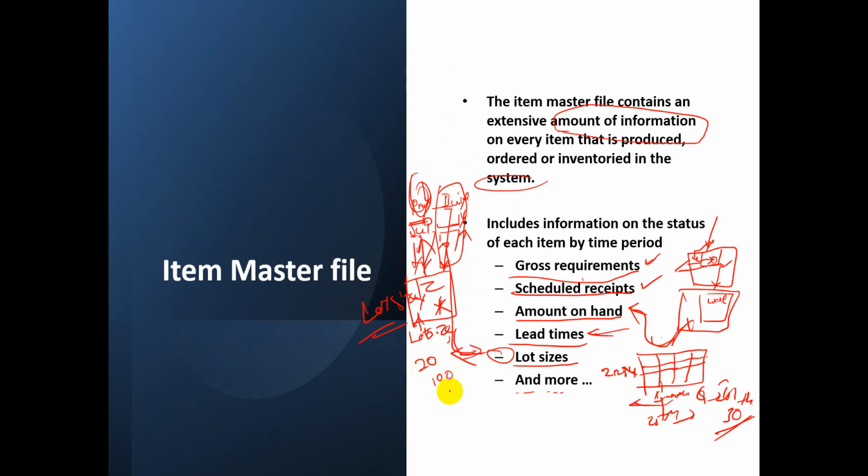As a procurement engineer or PPC, they have to verify whether the remaining 80 is going to be used in the next projects. They have to verify, and then they can accept these lot sizes from the supplier. This is a very important aspect, but this kind of lot size is only available for small price materials. You can't see this kind of term for large items like a bearing or sensors, something like that.